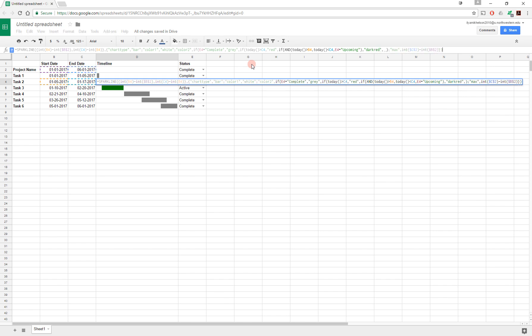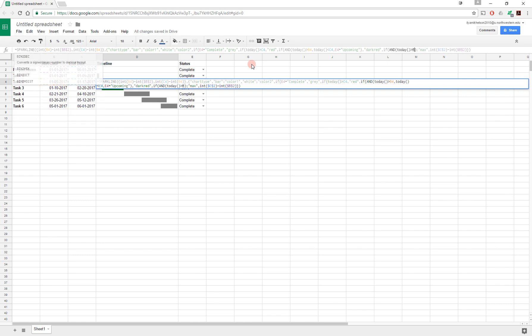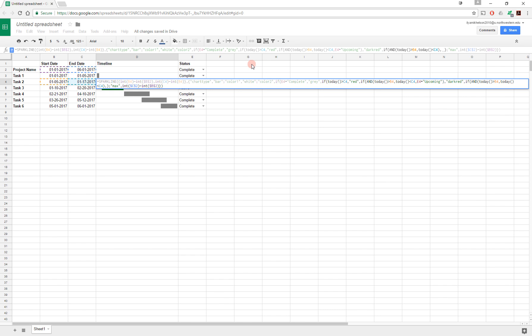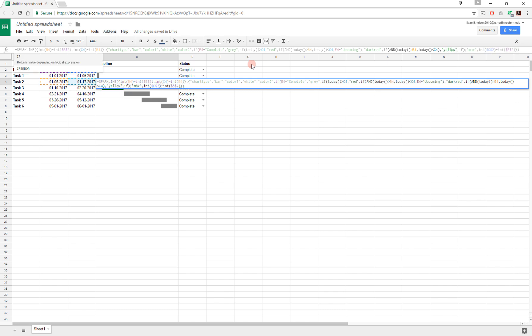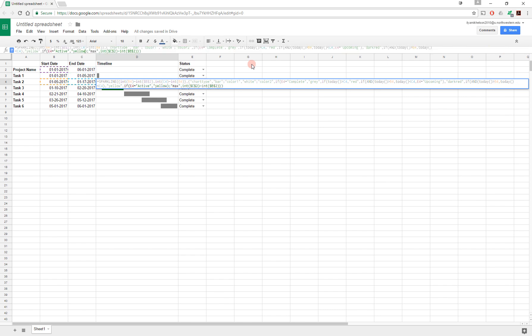And otherwise, if, and today is greater than B4, and today is less than C4, so again, if we're inside of this project window, then I'm going to mark this as yellow. And if E4 is equal to active, then I'm going to mark this as yellow. Otherwise, I'm going to mark it as green.